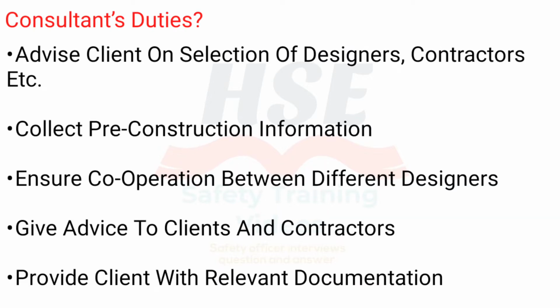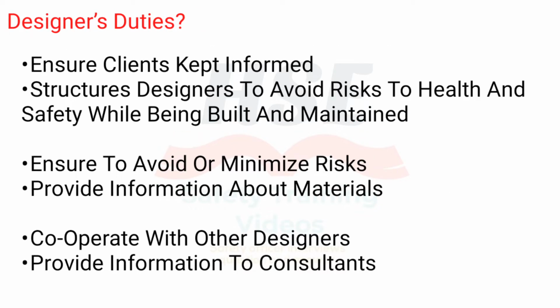Consultant's duties. Advise the client on selection of designers, contractors, etc. Collect pre-construction information. Ensure cooperation between different designers. Give advice to clients and contractors. Provide the client with relevant documentation.